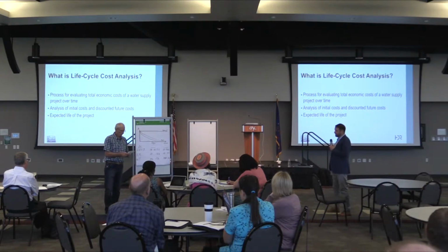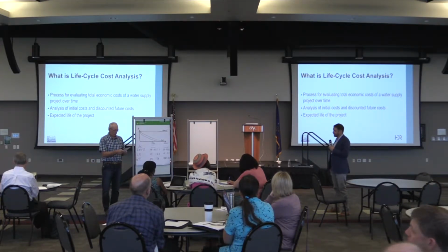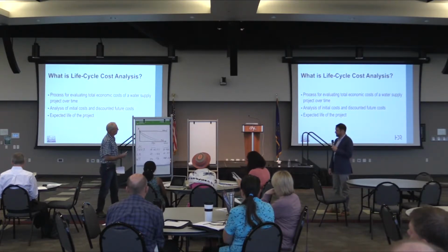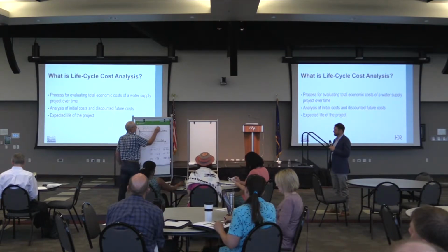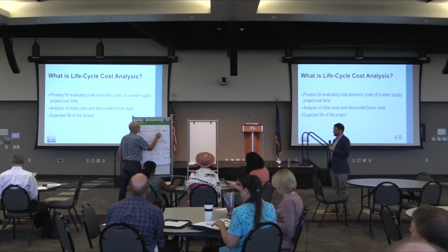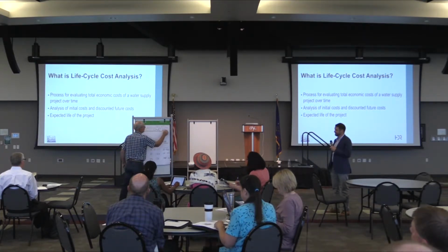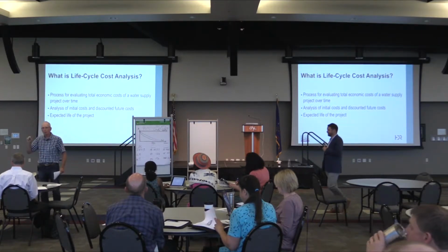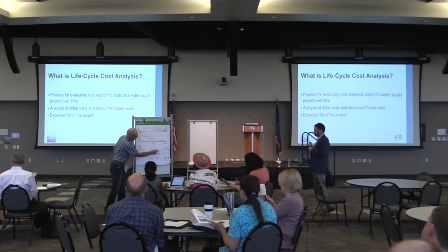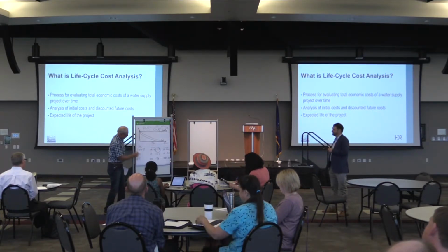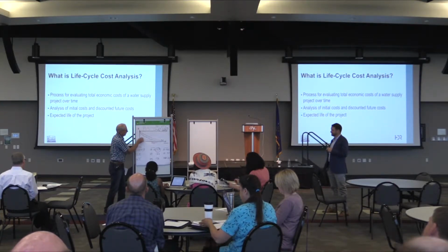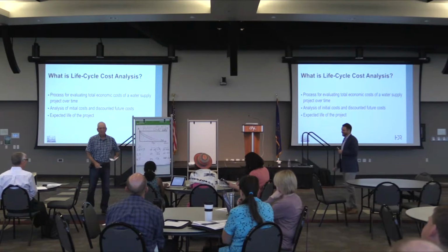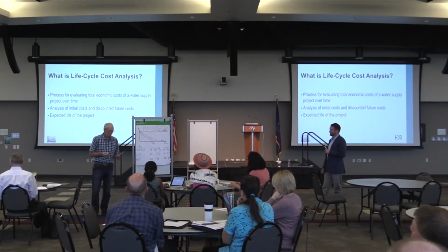And real quick, a lot of these concepts are covered in the guidance. Right now we're talking about discounting, and there is a section on discounting in the guidance that shows the equation of how we get to these values. The present value of the cost equals the cost in year 1 over 1 plus the discount rate raised to the 1st power, plus the cost in year 2 over 1 plus the discount rate raised to the 2nd power, and so on, up to the cost in year 50 over 1 plus the discount rate raised to the 50th power. If you add all those up, this is the number you get. You multiply the flow by 17 at 2.875%, and that gives you the area under the curve, which is the present value of that. We said we weren't going to do any math. I'm sorry. Well, that's just simple arithmetic. You can all do those in your head.